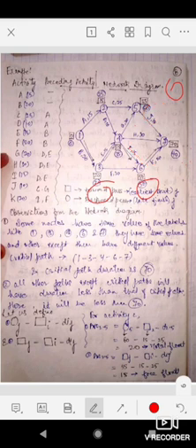So I will tell you once again. See, this is 70 minus 30, it will be 40, but we haven't taken 40. 70 minus 20, it will be 50. 50 minus 15, it is 35, because by this path we are getting 35, here we are getting 40, and by this path 60 minus 20, 40. So we have taken the minimum of those three, which is 35. That's why I have written 35 here. 35 minus 15, it is 20, and here 50 minus 20, 30. So we have taken the minimum of those, so it will be 20.